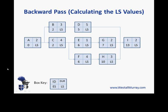Now let's do our backward pass. Starting with I, because we're going backwards, we set the late start to be the same as the early start — so we put 13 in there. Working backwards, for D, G, and H we use the formula: late start of the current task minus the duration of the predecessor. For D, the late start of I is 13, the duration of D is 5, so we subtract — the late start of D is 8. Likewise we calculate those late starts for G and H.